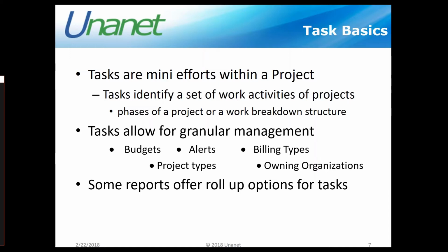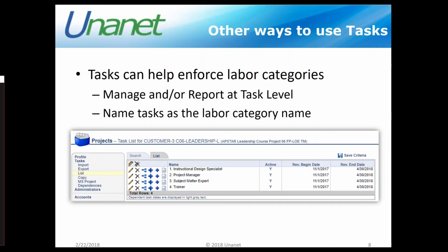Let's talk about a couple of other ways that we could use tasks. Tasks can be used to enforce labor categories. Earlier, I mentioned that there's a tip for you on labor categories. Even though labor categories are set up at our project level, if we want to control our labor categories and use tasks for that, we could set our tasks up with the name of the labor category. And then if we managed and reported at the task level, this would be a nice way where we could control our labor categories at the task level.